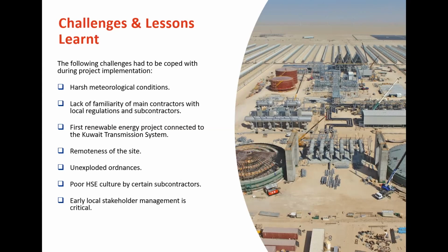Definition of KPIs, establishing also a disciplinary program to make sure that people could be dismissed from the site in case of not complying with these HSE protocols. And another lesson learned that was enforced in some of the projects was to make sure that adequate contract terms were in place, so that contractors and subcontractors were obliged to work as per very high and adequate HSE standards.